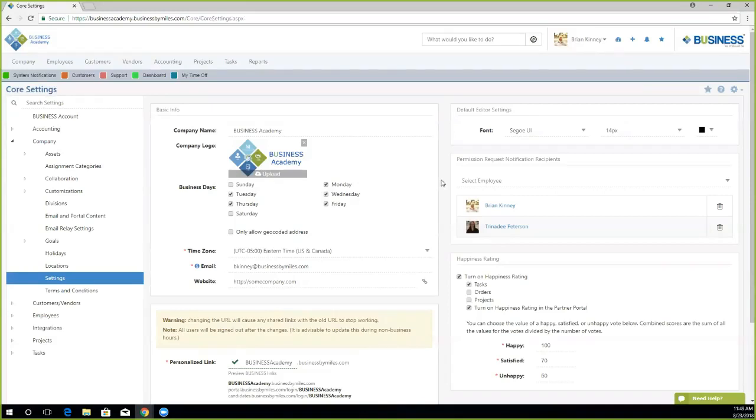So if you have those three things, you have an end date, tasks, task budgets, and your business days configured, the burn down report should work perfectly in terms of projecting the total work hours that you need to complete the project on a certain date, and also the estimated completion date based on the burn rate hours you enter.